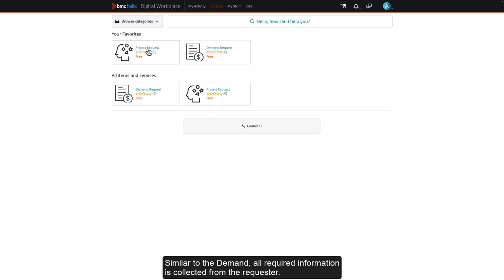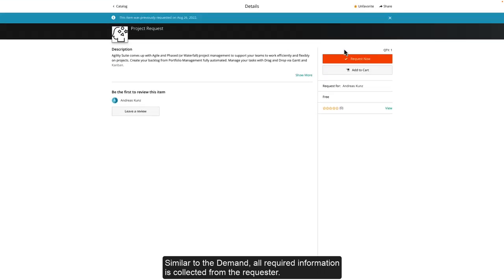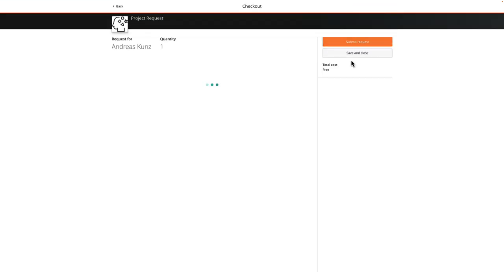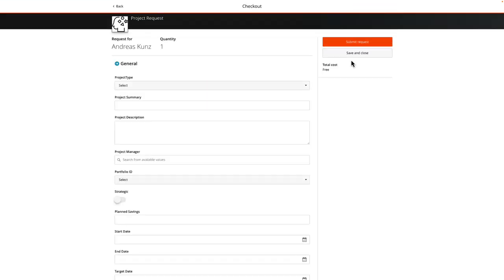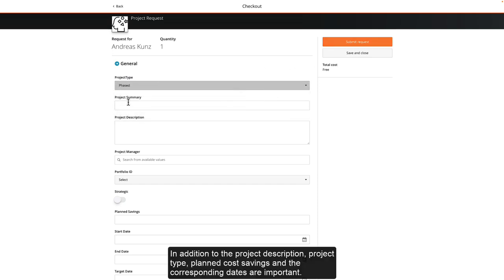Similar to the demand, all required information is collected from the requester. In addition to the project description, project type, planned cost savings and the corresponding dates are important.